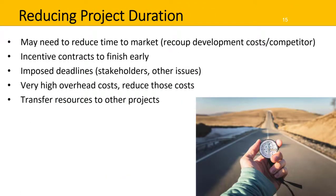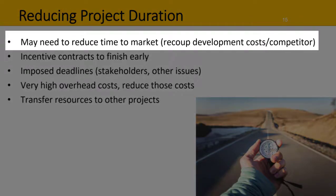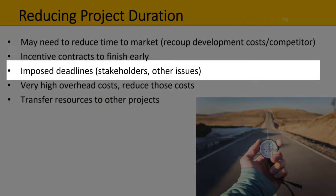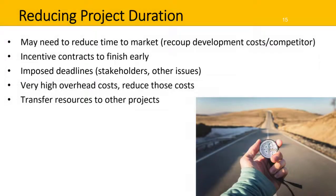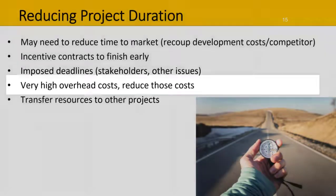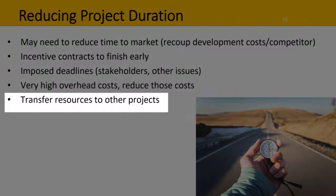In some instances, you'll want to reduce the project's duration — that is, get it done faster. You may need to reduce time to market, for example, to recoup development costs or to respond to a competitor. You might have incentive contracts to finish early or imposed deadlines — for example, the CEO or director might want the project completed by a certain date. You might have very high overhead costs and need to reduce those, or you'll need to transfer resources such as people and equipment to other projects.